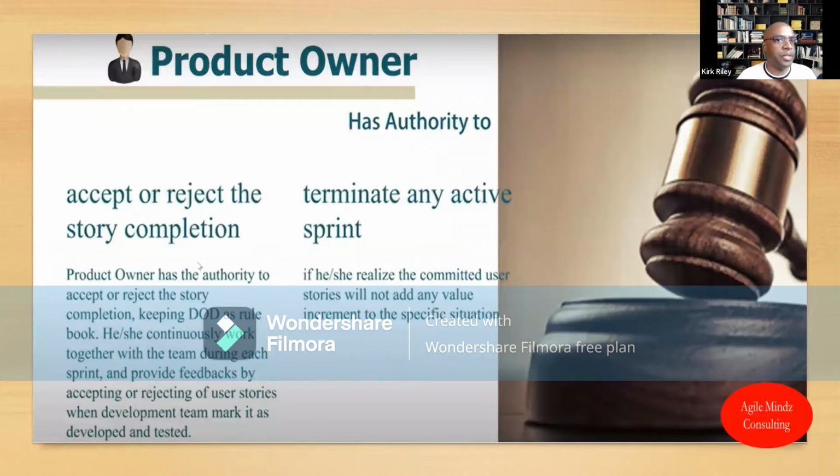For number one, just to let everyone know that you as a product owner, you're not alone when it comes to prioritizing the backlog. You can also receive help from the Scrum Master and the developers, because they can assist you with prioritizing a backlog by sharing information about estimates, any dependencies, any technical work items, et cetera. And you as a product owner, you have to ensure that the team has a shared understanding of the project vision, the project goals, and the details of the work to be done. So, you're definitely not by yourself. You're still working with your team to make sure that you're maximizing value.